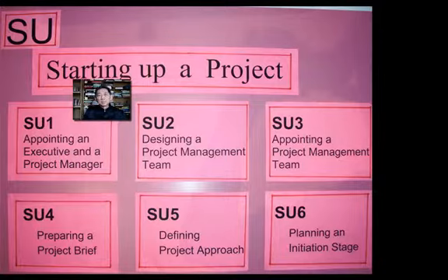So bear in mind that if you don't have an executive and a project manager, one to make major decisions and one to actually execute the project activities day by day, then you really shouldn't start a project. If you have a project manager and nobody has been identified or appointed or has volunteered to be the executive and agreed upon, then really the project should not be started, right?